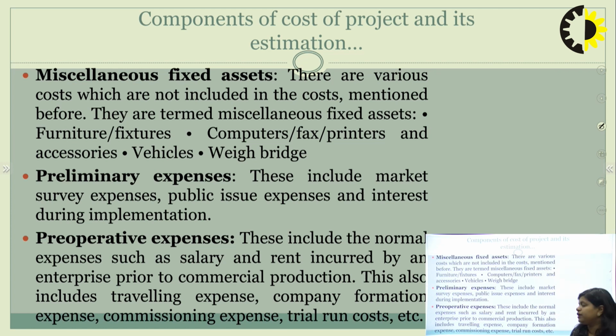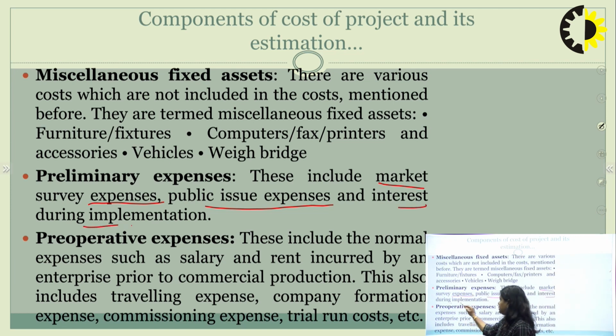This kind of preliminary expenses includes market survey expenses. They include public issue expenses and interest during the implementation. It may be possible that at the very first point, at the seed of the project, you actually took some kind of loan from other sources.